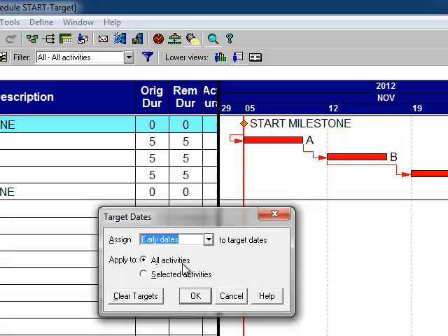This is what you're going to measure every day's activities against for progress. This has to be the final plan you think is your best shot to finish the job per the contract and on schedule. So don't ever just lightly say, oh, it's time to do the target schedule. The whole team, and I mean you and the owner and all your subs, need to agree. This is the deal. This is what we're going to measure our progress against. And if we're behind, we're going to spend money to get back on track. So you're going to use this as a management tool to say, I'm in trouble or I'm okay. So don't ever lightly make the decision at just some point, willy-nilly, this is the target schedule.